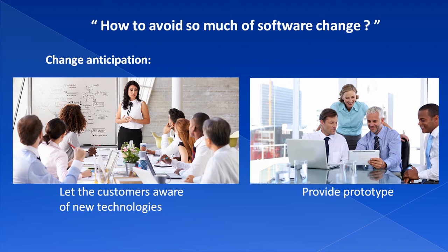So what you can do is create a dummy setup or a dummy software, which is not the correct one, and you can show it to your customer and actually tell them to experience the situation, right? To get the QR codes, to scan the QR code, and to test the system, not actually testing, actually the field, to get the experience before the system is developed.